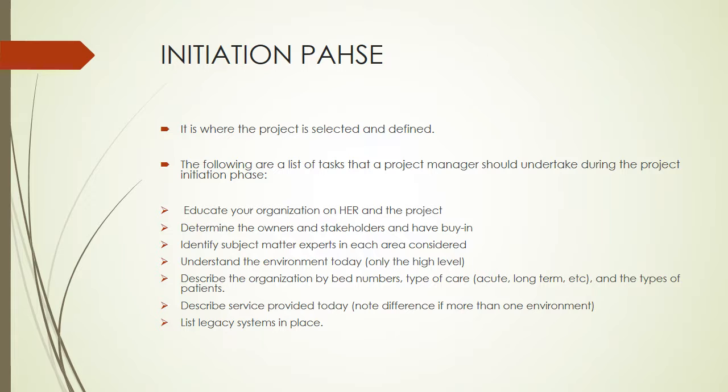First, educate your organization on EHR and the project, determine the owners and stakeholders and have buy-in, and identify subject matter experts in each area considered. Understand the environment today only on a high level, describing the organization by bed number, type of care, acute, long-term, etc., and the types of patients. Also describe the services that are provided today, and know the difference if more than one environment is involved. And lastly, list the legacy systems in place.